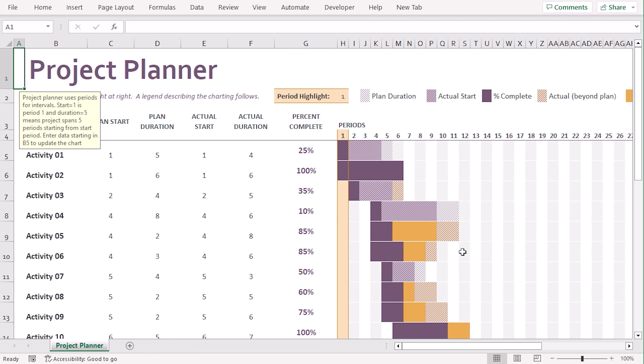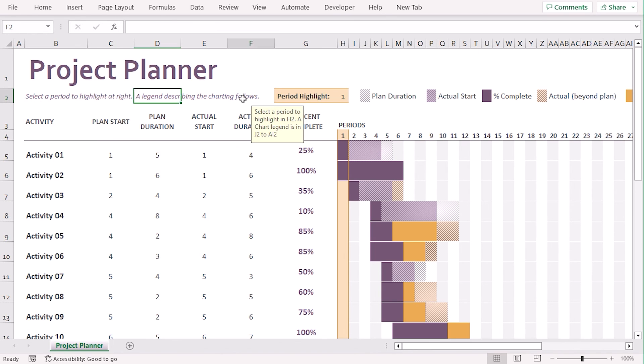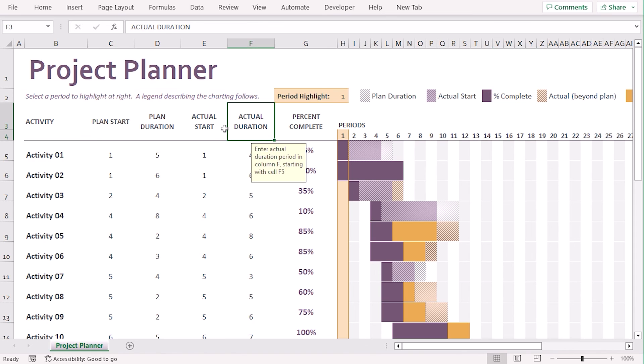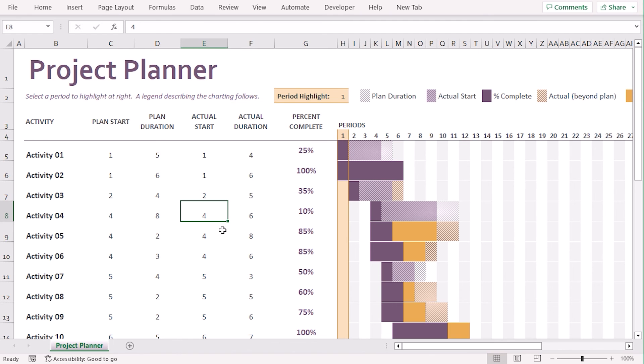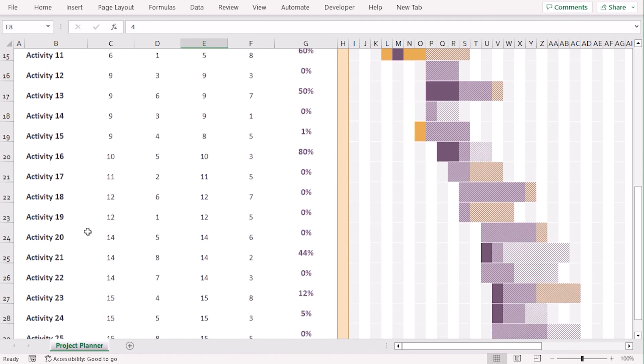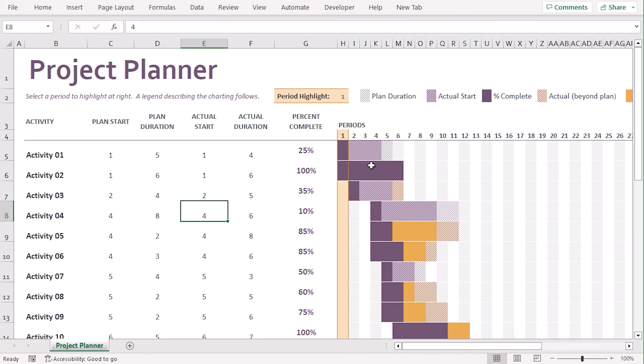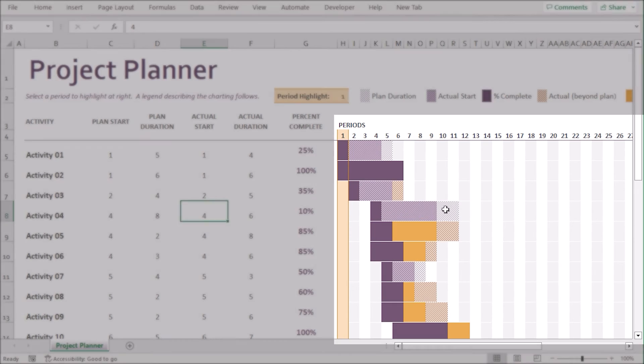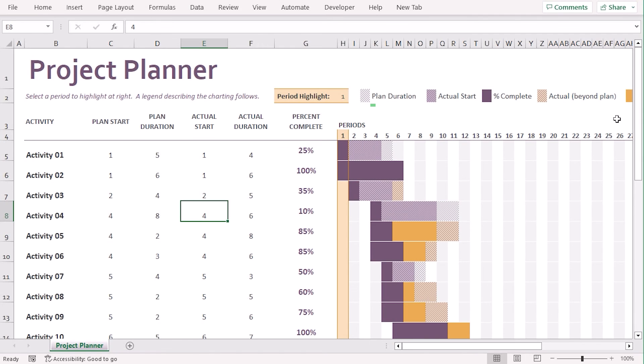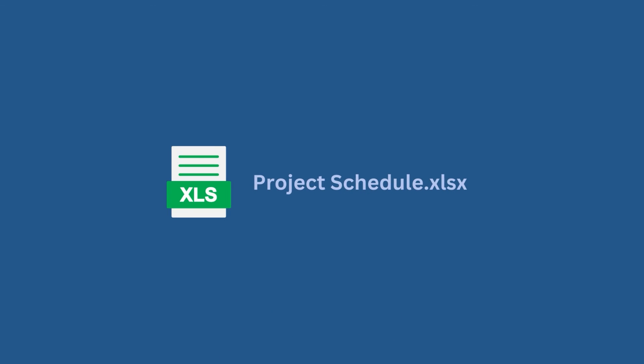Here, you can see that we got a new workbook where the template is already added. You can see that each cells have comments with them. The comments actually help you to modify the cells. You can see that each of these activities go along with plan start, duration, actual start, and the periods are added according to their period highlights.